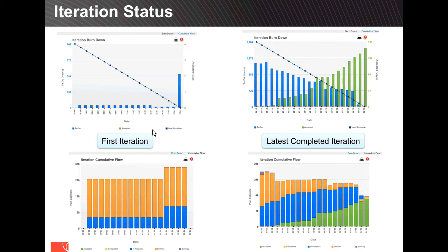And the reason we like to highlight that is because it points to generally good behaviors within the team. If you can accept work during the iteration, it means you've got good product owner involvement, you're able to review completed work, rather than waiting until the very last day. Sometimes there's a perception that, well, we watch the demo and then we accept the work. And that's really not how it's supposed to happen. It's supposed to happen earlier than that.